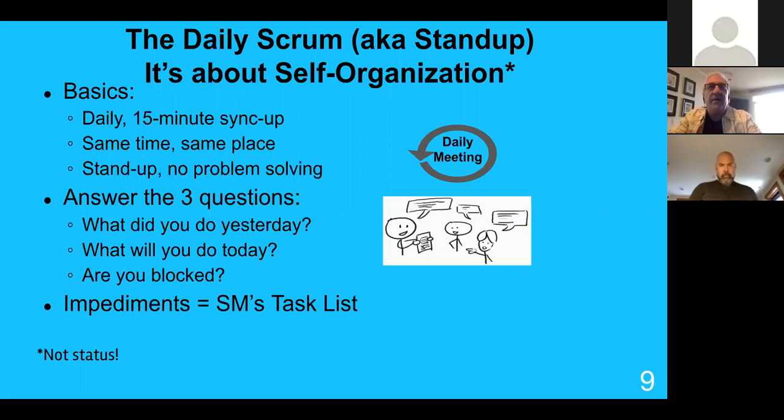One of the first things that's difficult sometimes for developers to understand is that you only do whatever the user story says. You don't do more, even though you're going to be working on it 2 days from now, or you're in the same code, or you have a really good idea about how to do it, or it would be easier overall if you combined 7 stories into one and worked all together in one place. You work a story at a time.